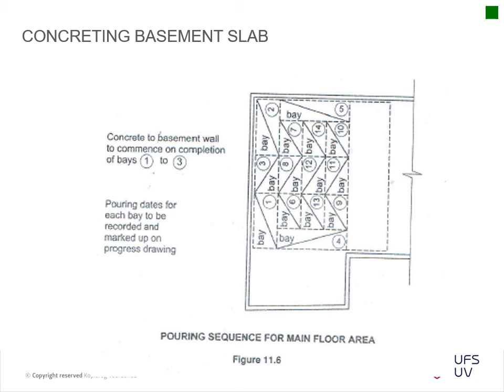Okay, then they just went into more detail of actually construction bays. So they've got certain blocks that they do their pours, because you can't pour a continuous block. Remember that site visit to SARS where we had the construction joints and the saw cut joints for the expansion or movement of your concrete. That's basically why you have to plan boxing in your concrete pours within the specified parameters from the contract or engineer. Okay.